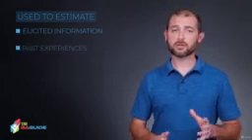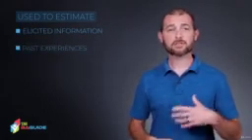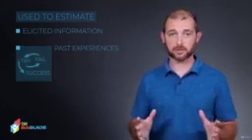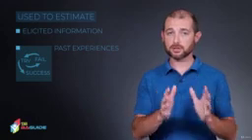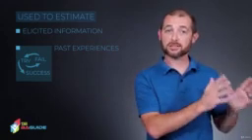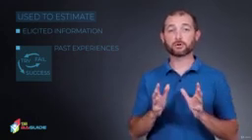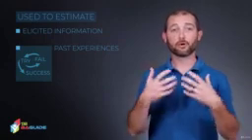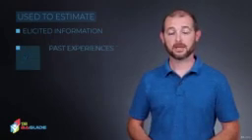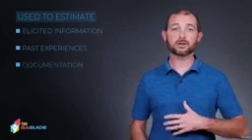Secondly, you want to utilize your past experiences. So this could be experiences on other projects or other user stories that are similar to this, where now you can utilize the lessons learned from that past user story to actually help you create your best estimate for this user story. And finally, you can also use various documentation from your organization.